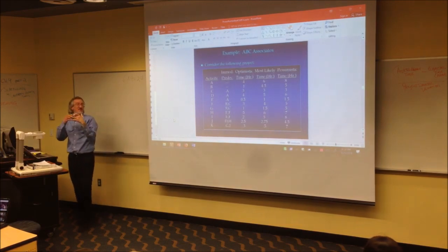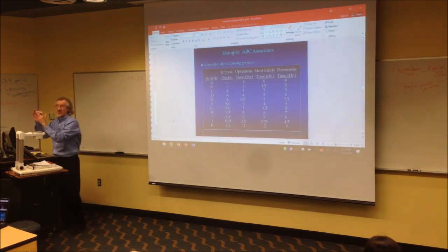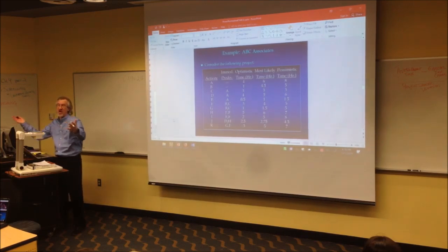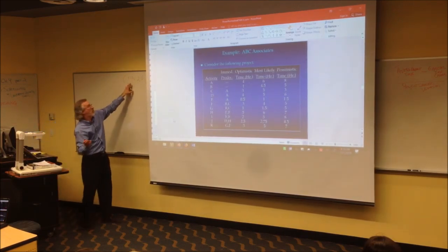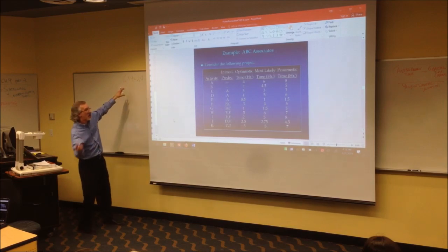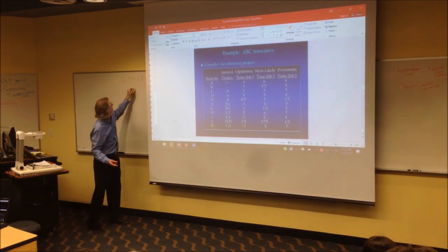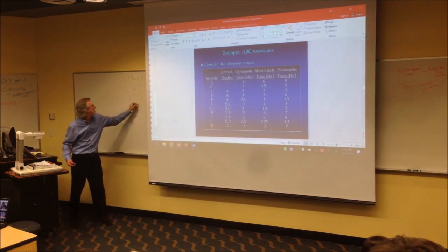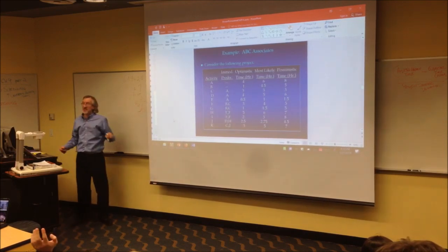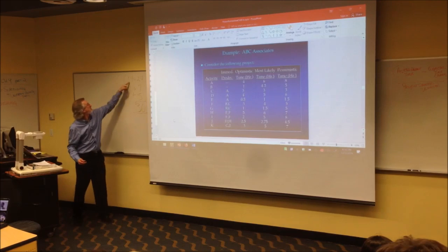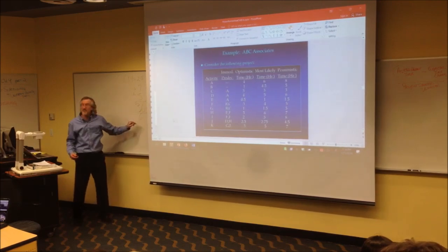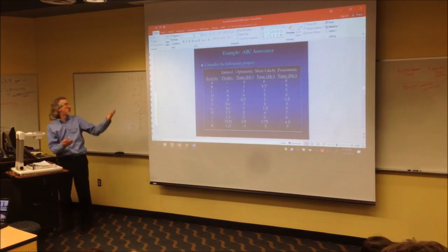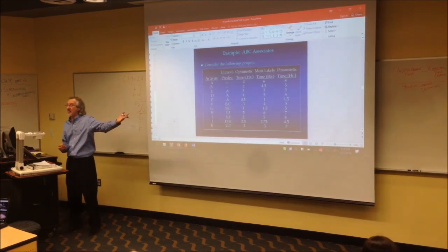It's putting 4 times the weight on the most likely time compared to the other 2 times, the longer and shortest time. We're then going to take 4 of those and add the longer time, which is a 7, and the shorter time, which is a 5. So we got 29, 36. Then you divide by 6. Our weighted average, because we're putting a bunch of weight on the most likely.